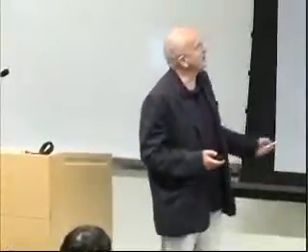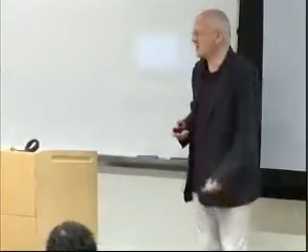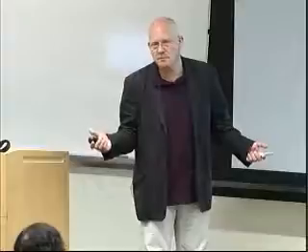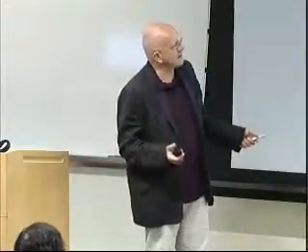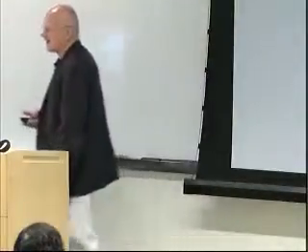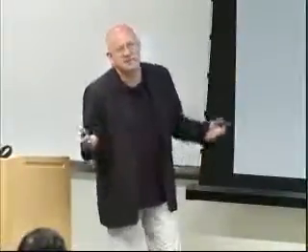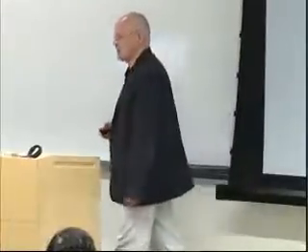So it's a curve. The cost curve is growing here. The benefit curve from getting better and better information at some point in time is saturated. So the increase from this level of perfection to this level of perfection is relatively low, right? So we can easily, as a discipline, create something like a cost-benefit curve, and there is a sweet spot where perfection of information is paying off, and that's the message here. And there is something like an ROI, and this ROI really means how much should I invest into better decision making.